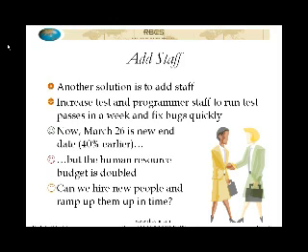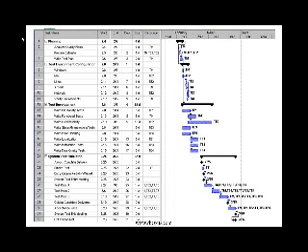And this is another thing out of Fred Brooks' book, Mythical Man-Month. It's called Brooks' Law. Adding more people to a late project makes it even later. And it's based on the idea that when you bring people on, in order to ramp them up, somebody has to ramp them up. Somebody's got to train them. Well, those people who are ramping them up are people who would otherwise be doing real work on the project. So we could actually have the completely unintended side effect of delaying the project. Here's, based on the assumption that we can make it work, a schedule